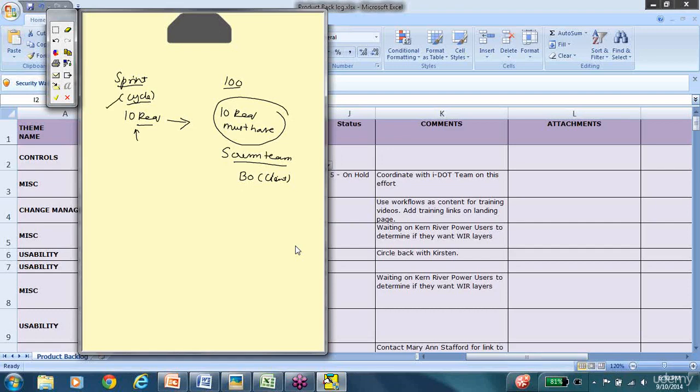So this will reduce the risk of us building a software that is not fit for use by the business owner. So when the sprint begins, you will take only a part of your product backlog and create your own sprint backlog. So sprint backlog is again a list of user stories, but these user stories are specific to the ones that are going out in this particular sprint.